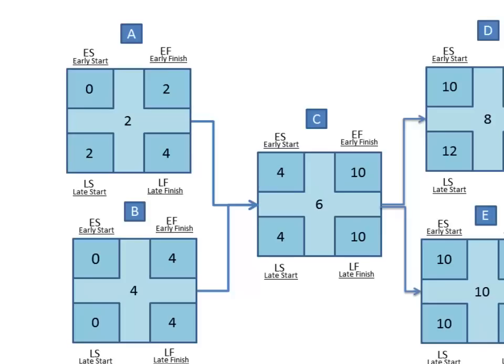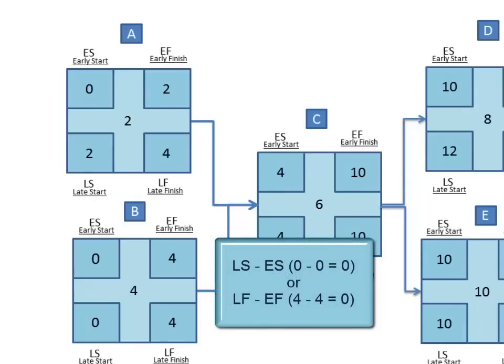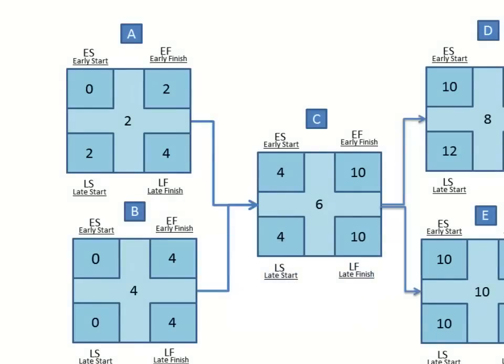Let's head to task B now. To calculate the float for task B is either late start minus the early start, or zero minus zero, or you could calculate the late finish minus the early finish, which is four minus four. Again, either of these calculations equals the same number, which of course is zero. So B has zero float.